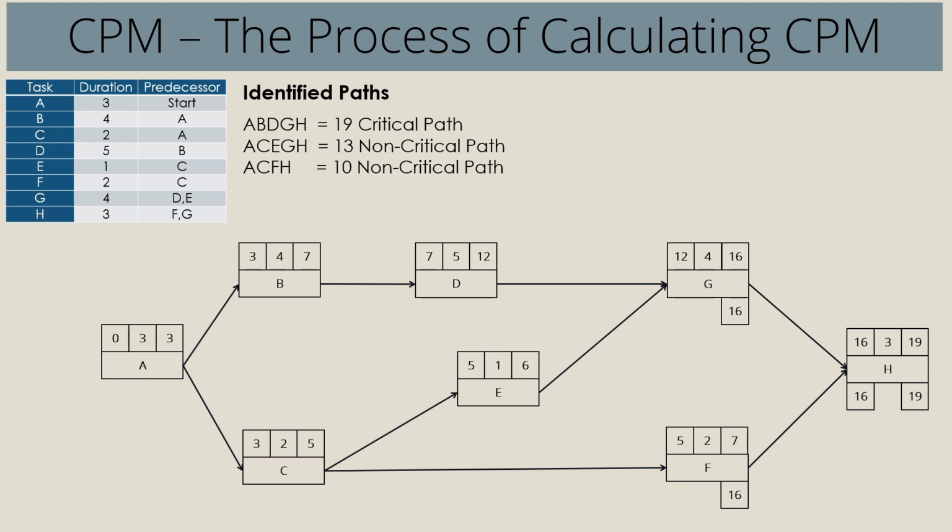So first of all, for activity G here, 16 minus 4 as LS for activity G, we have 12. And again, we can bring this 12 as LF for activities D and E because there is only one arrow leading in. So for activity E we have 12 minus 1 is 11, and for activity D we have 12 minus 5 is 7 as LS respectively.